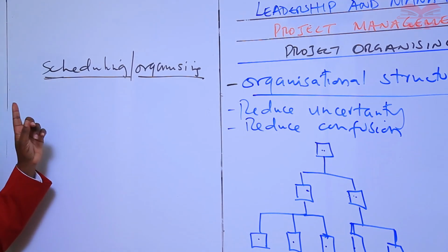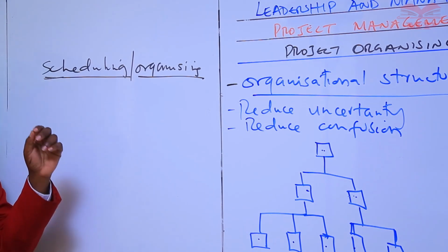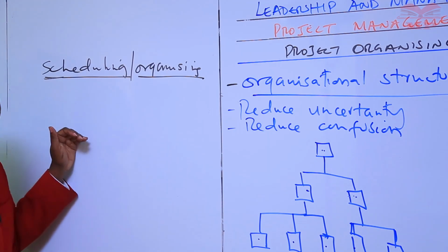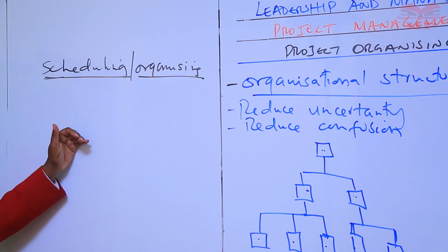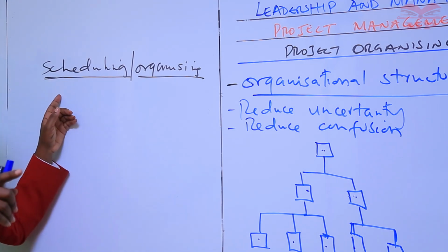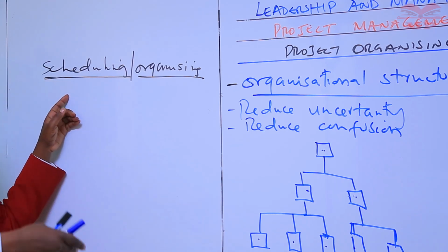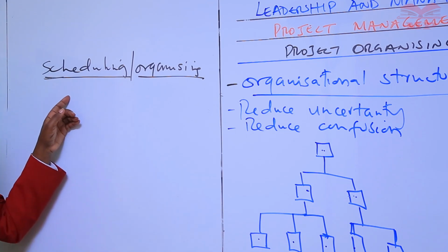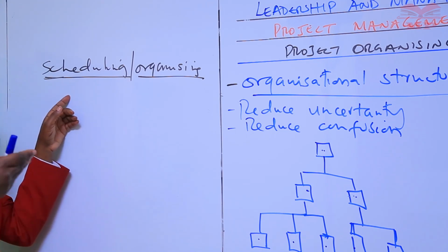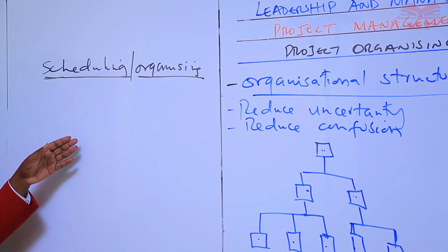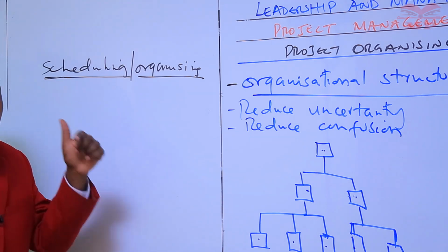And the project management team selects a scheduling model such as a critical path or an agile approach. Then the project-specific data such as activities, planned dates, durations, resources, dependencies, constraints are entered into a scheduling tool to create a schedule model for the project.